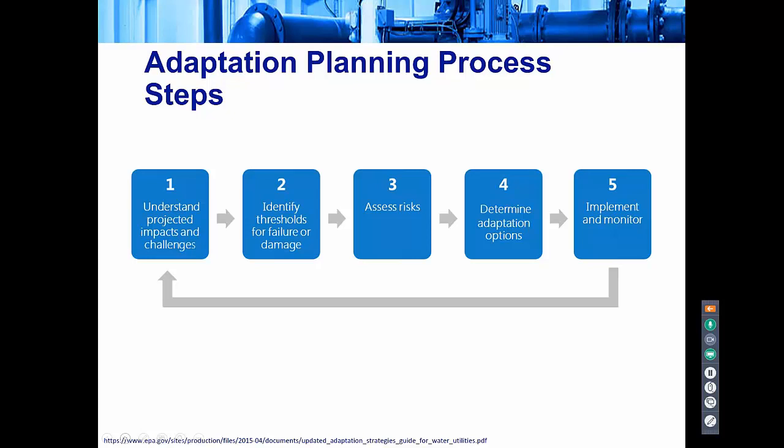Next, you want to identify the most critical assets and then get a better understanding of what impacts might potentially damage those assets. So you want to do a risk assessment. And this can be as simple as just, again, picking the most critical assets that you think are most vulnerable, or doing a full-scale assessment of every single risk for all the assets that you have.